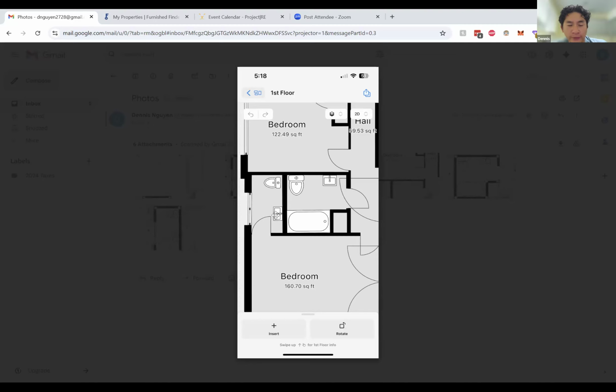If I'm doing it that way, would it make sense for me to just pull the permits myself, acting as an agent, or should my contractor still pull the permits when they're doing the work on their own? Well, you could pull the building permit as an owner, and then they would pull the electrical, mechanical, and trades. Oh, I see. Okay, that makes sense.